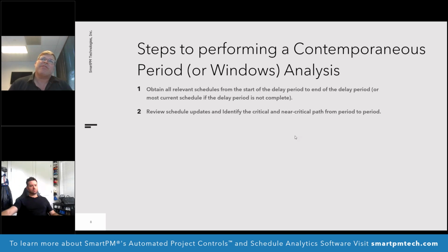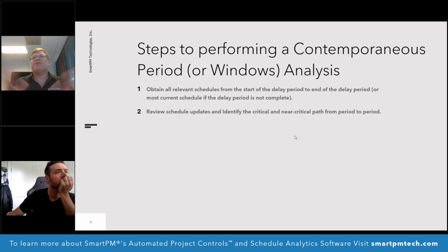Say on the near critical path, your durations were a little bit aggressive, and had they been accurately assessed and were twice as long as originally planned, that would mean that actually was the critical path. And you can play around with this information. So you want to look at both, and you want to make sure that you understand both.